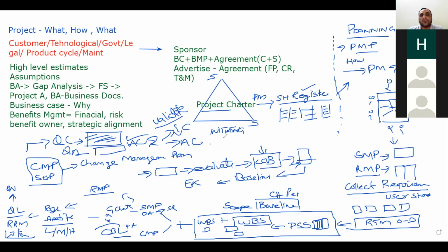So these things will be updated in the lessons learned registers in OPA, so in the next projects we can get the benefits, and the reports will be submitted to the relevant stakeholders. The team will be released accordingly, and then the project manager will also be released from his duties, and he can start a new project. If there are claims open, the project manager cannot release himself. He may release the team, but he cannot release himself until all the claims are finished, if they are legal.